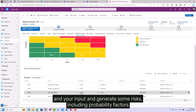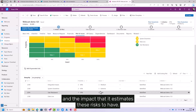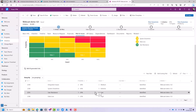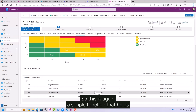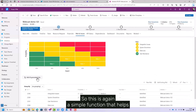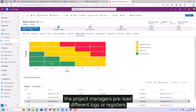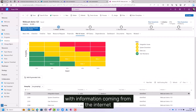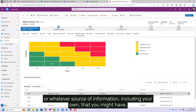This includes probability factors and the impact that it estimates these risks to have. If you had said 20 risks, it would have created 20. This is a simple function that helps project managers preload different logs or registers with information coming from the internet or whatever source of information, including your own.